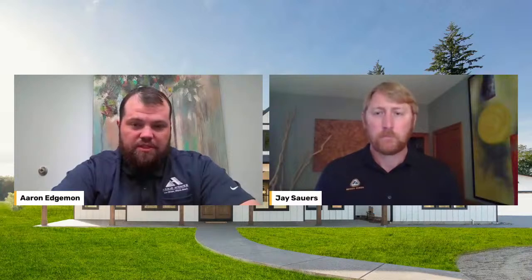So Aaron, at a very high level, can you explain to everyone what a property evaluation is? Yeah, a property evaluation is when we come out and assess the site to make sure that we can execute on the house you want to build. We're looking for accessibility, site conditions as far as grade, helping you determine the best layout for the house, and things you might not have thought about that could help with better resale or potentially lower cost with site development.